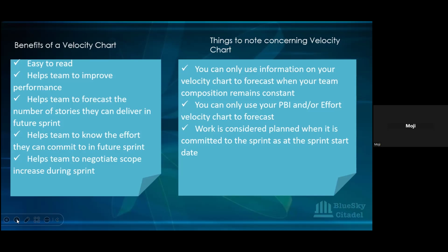And then you as a scrum master talk to your technical people, your developers, tell them to have a look at that story, tell them to digest it. Do you think realistically we can complete it? They will tell you they can't complete it. And then you, as the person shielding the team, have to go and tell the PO that the guys have looked at this, it's not possible. We will give it a go, we will start, but we're not promising that we're going to complete it.